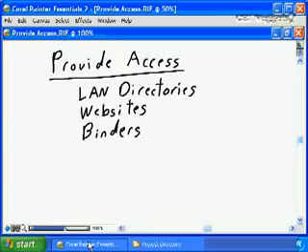As discussed earlier, I personally am a huge fan of creating project websites and providing that same information in a project website. To me, the advantage of doing it through a website as opposed to a LAN directory is the website presents the information typically in a read-only format, i.e. HTML, so that if someone decides after the fact, oh, I don't like that work assignment that was put in that monthly status report from 2 months ago, or I don't like that comment, I think I'm going to go in and change it.